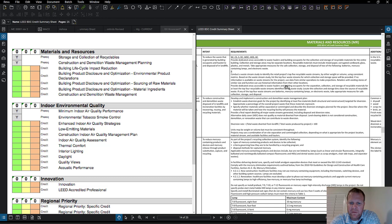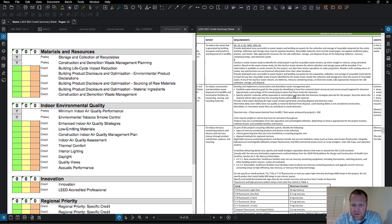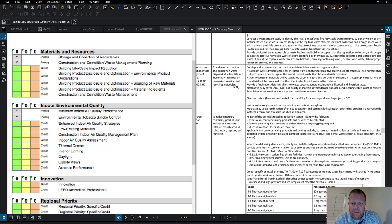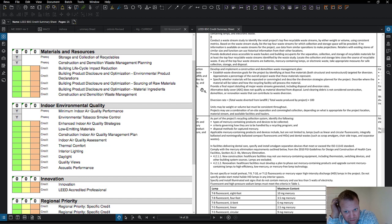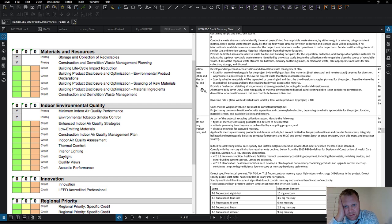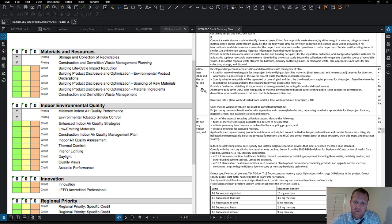One of the challenging things is demolition. There's also a credit to reduce construction and demolition waste disposed of in landfills. Concrete is super dense and very heavy, so concrete demolition is tricky. On one project we had to demo a large area of concrete paving and we recycled it into road base — that was really successful. By weight, the percentages of recycled material were very high because of how much concrete there was.